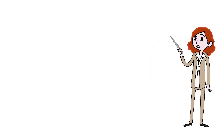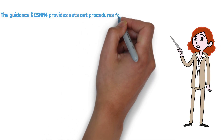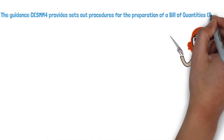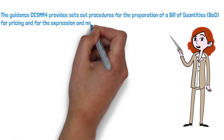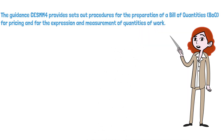The guidance CESMM provides sets out procedures for the preparation of a bill of quantities for pricing and for the expression and measurement of quantities of work. Once a BOQ has been built, it permits tenders to be prepared efficiently and can be used to value and monitor work completed once the contract has been awarded.